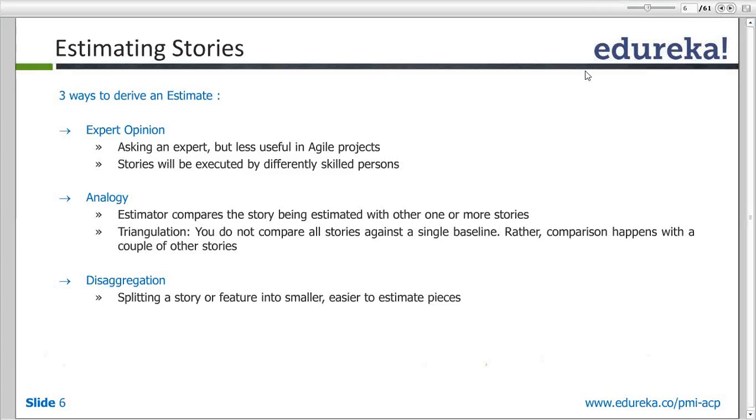Okay, so I'll take 2 days in creating the UI. I'll take 6 days in implementing the field level validation. Then I'll take another 4 days to create the sign-in functionality and the landing page. Then I'll take 1 day to unit test it, and the testing team will take probably 4 days to write the test cases, and execution of test cases would take another 1 day. So this level of estimates happened at a very granular level. You broke down your requirement to the minimum possible granular level, right? So here you were talking from creation of the test cases to execution of the test cases, creation of UI to implementing the complete story, to integrating the complete story. So this is how you divided your requirement into stories, into tasks, and then those tasks were estimated.